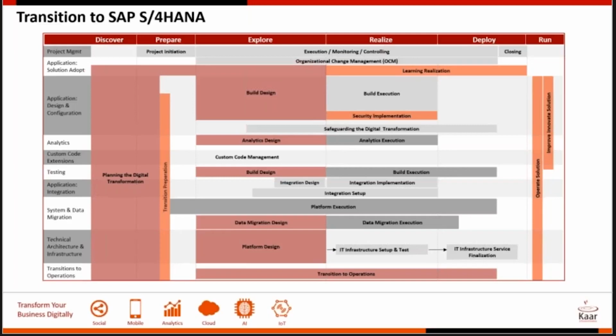And the second reason is that each time you do a mock run, you're running it on a copy of production. Then when you finally do your production run, the only difference you see is the change in the transaction data that has happened in between. So this gives you a very good way of doing the conversion, so you don't hit any unknown errors in the last phase.